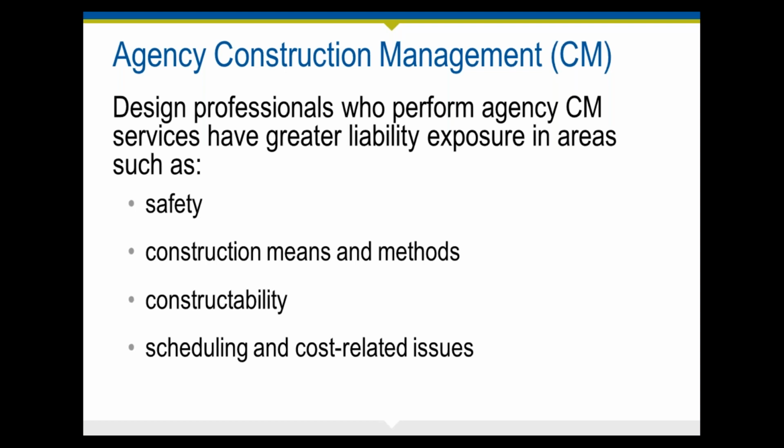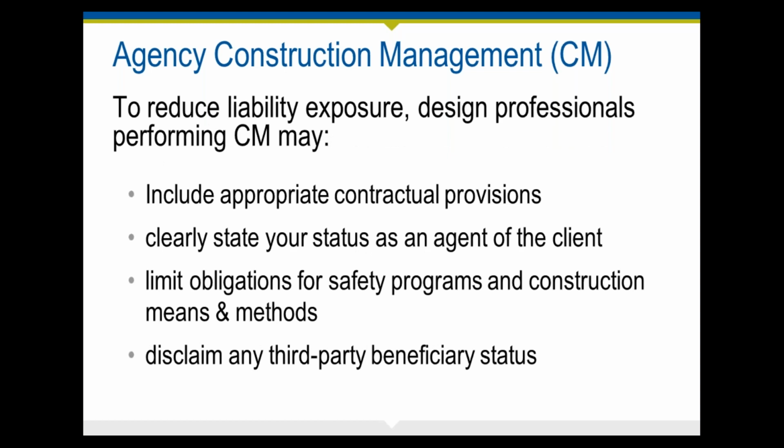So to reduce your exposure, and we think that this can be managed and minimized, you should have appropriate contractual provisions that appropriately protect you. Your contract should clearly state that your status, the construction manager's status, is as an agent of the client, and limit your obligations for safety programs and precautions, construction means and methods, and constructability review.